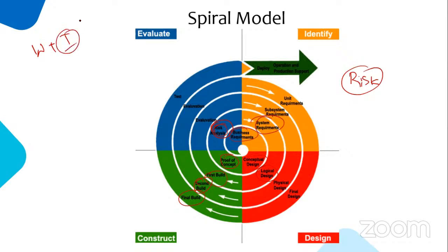Increment means iterative, means we are going to do development step by step. Same thing, but for example, out of 50, it's not sequential 10, 10, 10. You're going to take the top 10 which have high risk, the top priority ones. If you consider an e-commerce web application, which has more risk, it is payment. That is the most risky thing.